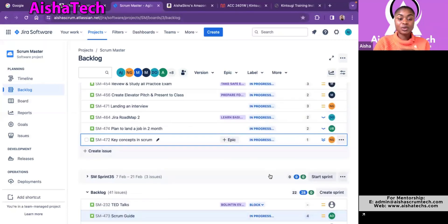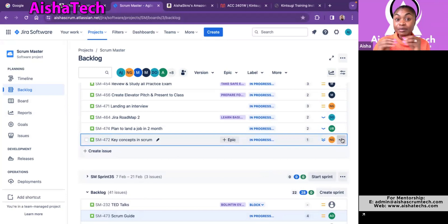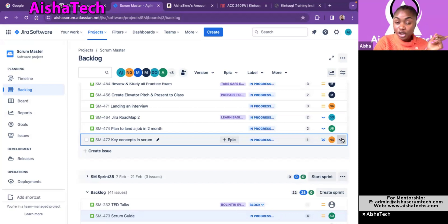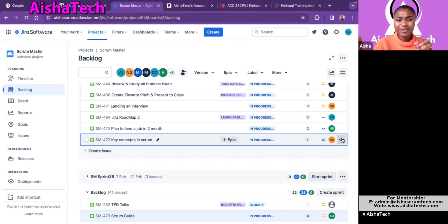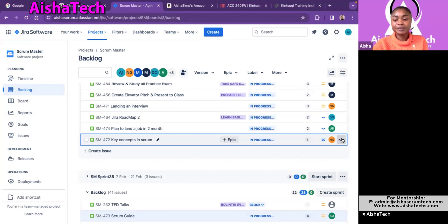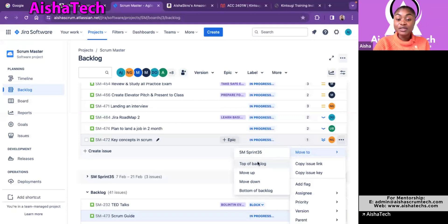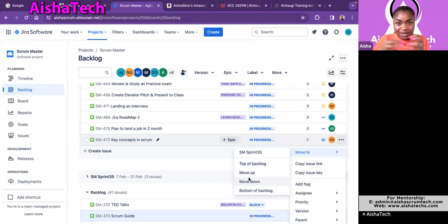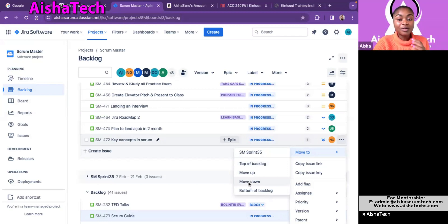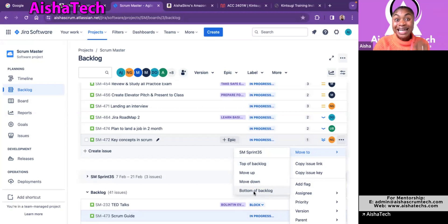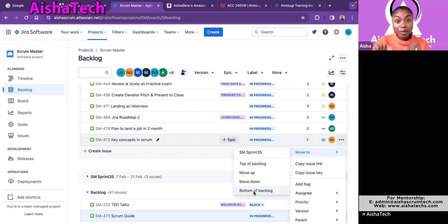Another way is also for me to select these three dots. You see these three dots? If you, I'm sure some Jira will have this, some Jira might not. I know every Jira look different. You might see me do some features in Aisha Tech YouTube page, and then you go back to your own job at work and you're like, oh, I can see that future. But it's there, it's just that it's hidden and it's different because we have a Jira server, we have Jira cloud, and this is the Jira cloud in case if anyone is wondering. So I hit these three dots, move issues to, I have all this option. I can either move it to SM sprint 35, I can either move it to top of the backlog, move up, move down, between, move up, meaning within the sprint itself, that won't affect the scope because if you move it, it's up and down. Move down, that's within the sprint itself. It won't affect the overall scope up and down. Bottom of the backlog, that's definitely going to affect it because why? That's the product backlog. When it says backlog, it means the product backlog.